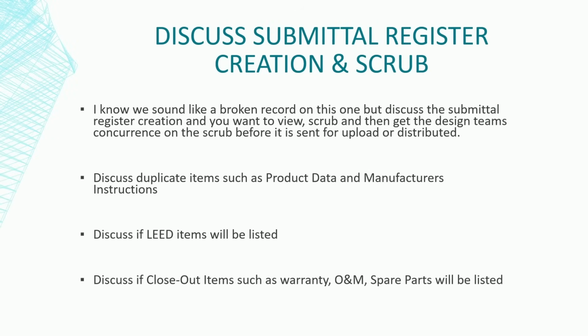Okay, I know we've talked about this. You guys are probably really tired by the time you're getting to this module of me going over submittal register creation and scrub, but this is a prime time. It's the first moment you're in front of that design team to set down the rules and to lay out the groundwork for how you want this to go. We sound like a broken record on this one, but discuss the submittal register creation and tell them you want to review it and scrub it, and then the design team's concurrence on the scrub before it is sent for upload or distributed.